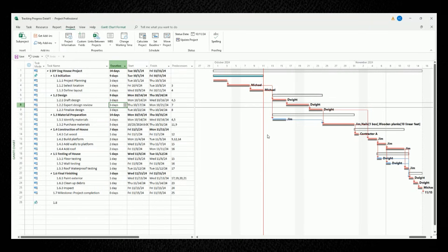So when we update our status date to be Friday, October 11, we're only updating the tasks that are leading up until the red status date line.